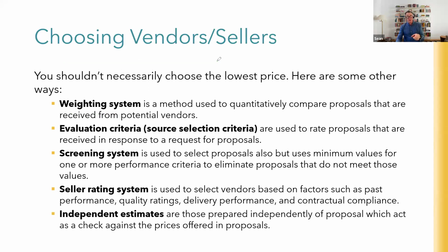Watch out for the old switcheroo. Seen this happen too many times. The proposal comes in, they promise you the senior experienced staff, they win the job, and then they swap them out for the junior staff. Don't allow that. Make sure there's a clause in the contract that says you're not allowed to swap out any staff without our permission. I do see that happen far too often.